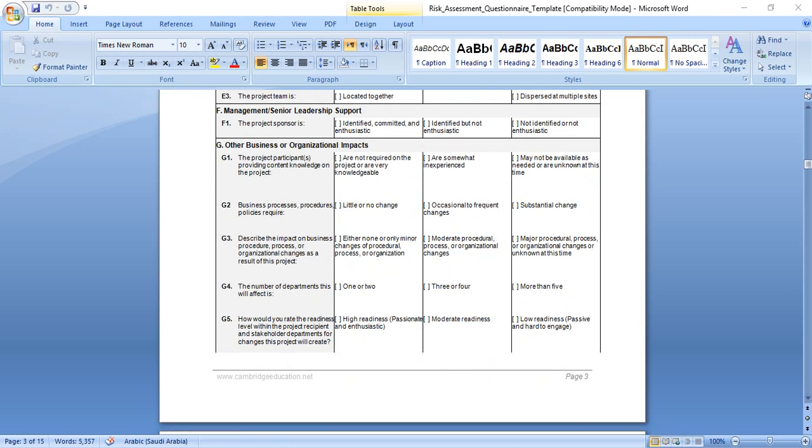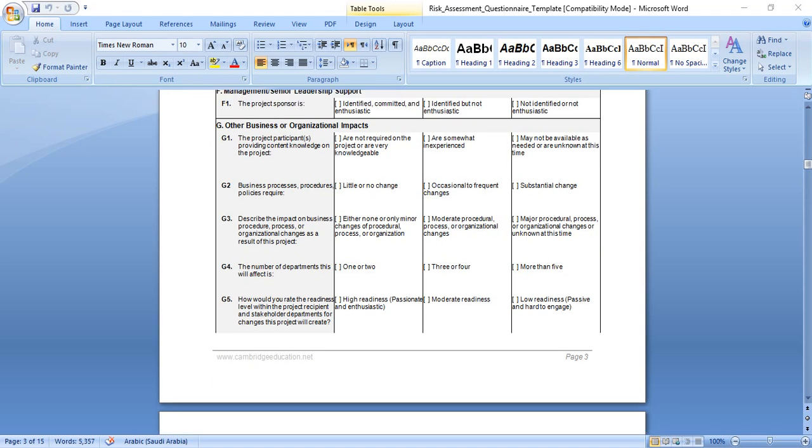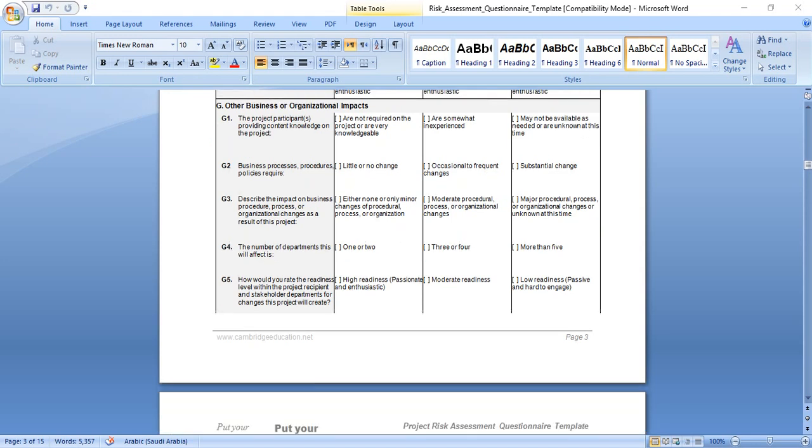Management senior leadership support: if the project sponsor is identified, committed, and supporting the project, this means no risk. Identified but not in social context, this means less support, medium risk. Not identified, this means higher risk for business organization impact.